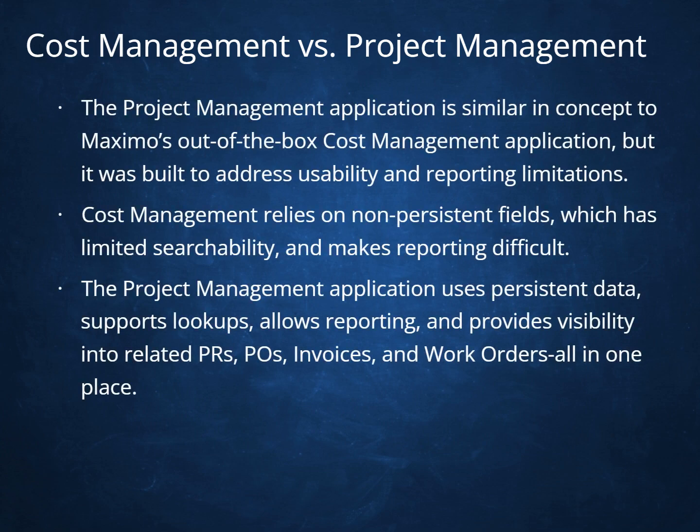Cost management versus project management. The project management application is similar in concept to Maximo's out-of-the-box cost management application, but it was built to address usability and reporting limitations. Cost management relies on non-persistent fields, which has limited searchability and makes reporting difficult. The project management application uses persistent data, supports lookups, allows reporting, and provides visibility into related PRs, POs, invoices, and work orders, all in one place.